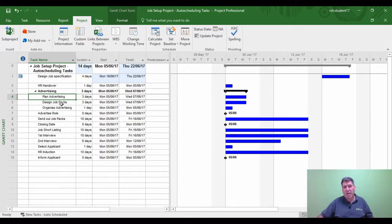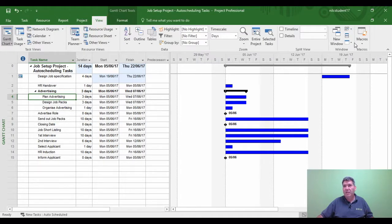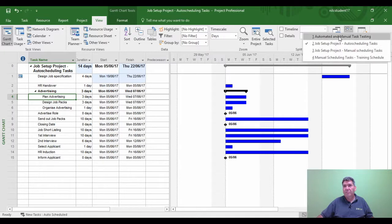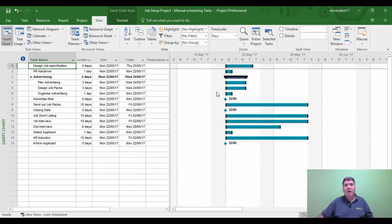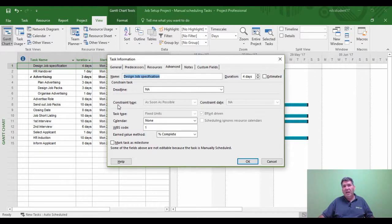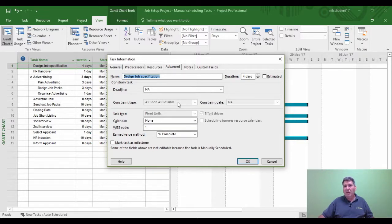Let's look at how this works with manual scheduling — it works slightly differently. Going to a manually scheduled project, I'll try the same example and put a constraint against task 1. Double-clicking, going to the Advanced tab — if you look at the constraint type area, it's greyed out. You are unable to use constraints with a manual schedule task. So the key thought here is: if you want to use Microsoft Project's automated features, use auto-tasks; if you want personal control over the tasks, use manual schedule tasks.